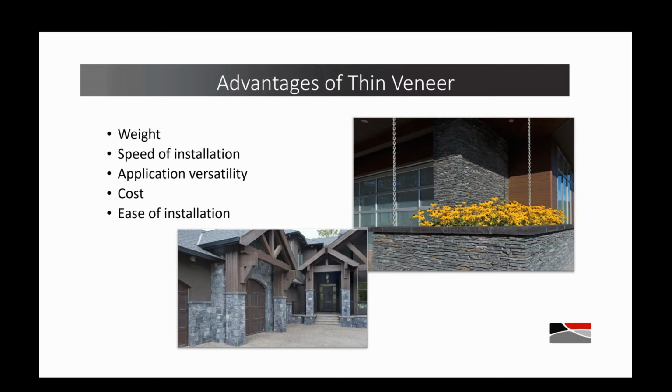And in some cases, you can find that natural thin veneer now is only marginally more expensive than manufactured stone. And finally, it's a much easier install process than full bed structural stone, and that can open the bid process up to a wider audience of contractors, and again, that too can have a positive impact on the budget for a project.